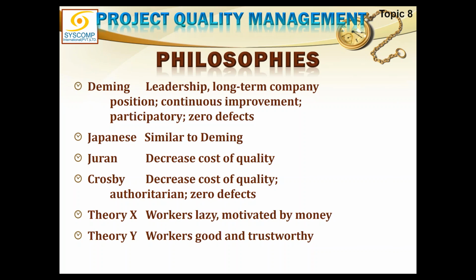Quality assurance talks about addressing those 50 items not by removing the defects, but by putting in place more stringent processes to ensure that these errors do not occur. Right? So there was a new emphasis on quality assurance of processes rather than checking the quality of the product. So emphasis has now been shifted from inspection to audit, or from quality control to quality assurance. And that was the basic Japanese revolution.